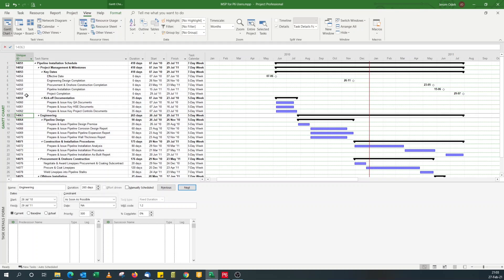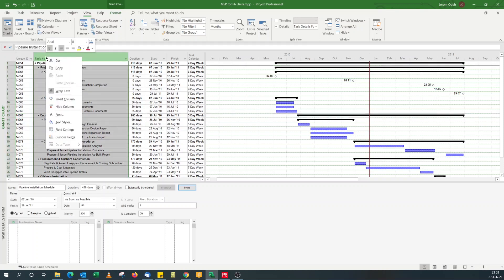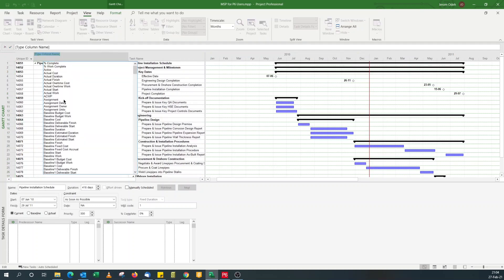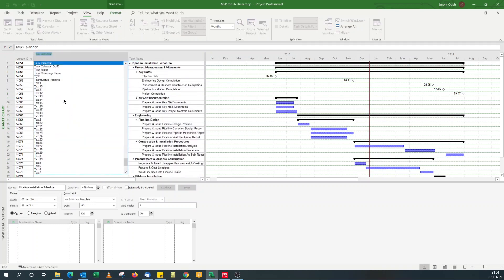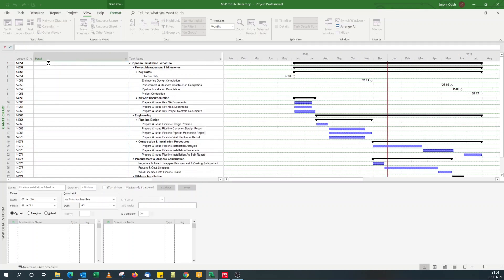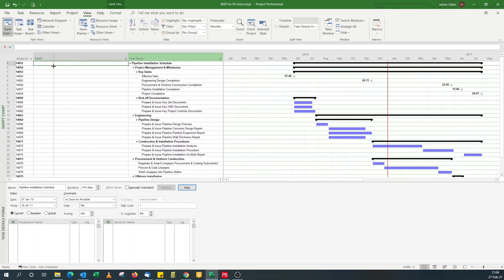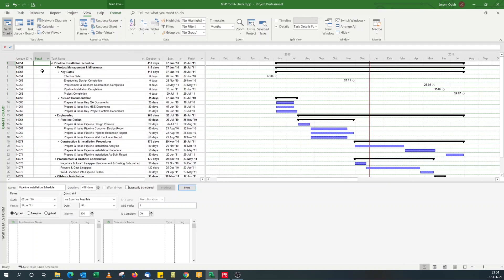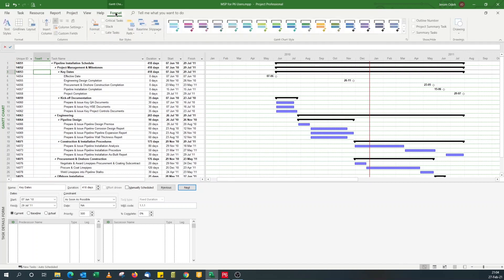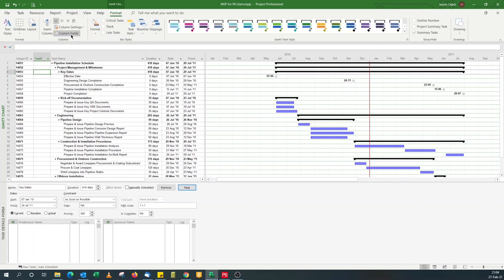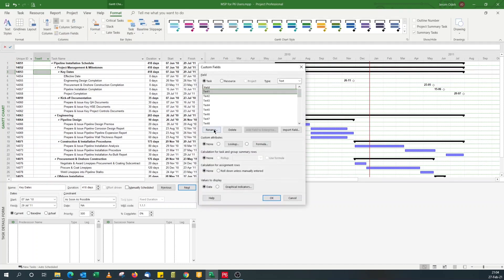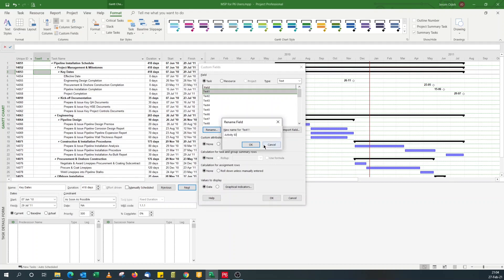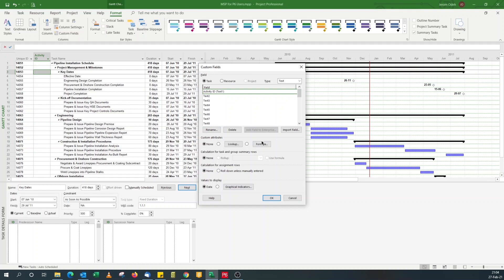But you can mimic an alphanumeric activity ID by using custom fields. That's the beauty of Microsoft Project. It allows you to come up with workarounds. So for this we use a text field. So if I go for text one custom field, what I need to do now is to format this custom field. Go to format custom field. Rename it activity ID.